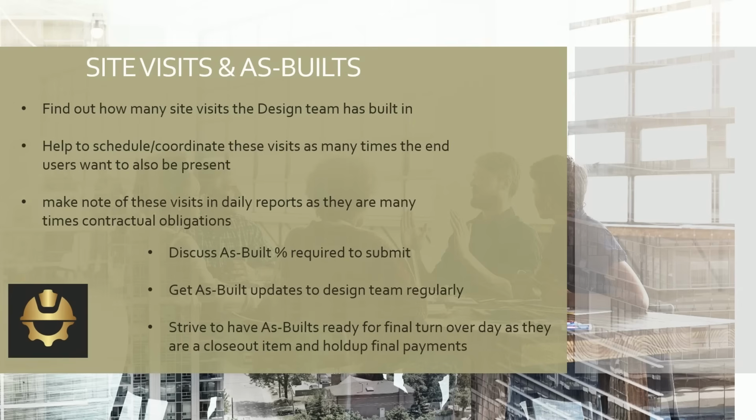So we strive to have the final as-builts turned in right before or the day of your final walk, like literally hand them the disc and give them the transmittal and be like, here you go. And then your project management team can submit that final bill. It makes a really big difference. It's a big feather in your cap as a QC manager if you shoot and manage for that. Yeah.